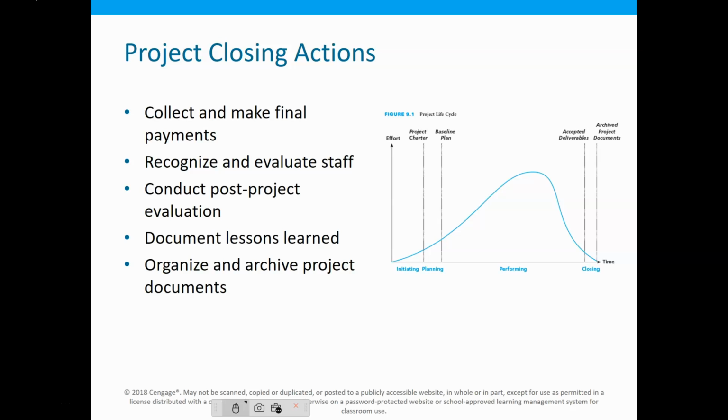A lot of times housing projects and construction get stopped because they're waiting on things like inspections. Nothing is more frustrating than to just sit there and wait because you didn't call the inspector quickly. Or in the case of construction projects, you didn't call 811 and get utilities marked, and you've got to sit there and wait 48 hours for them to come out and mark those utilities. Those kinds of things are very frustrating. That's part of that learned lesson.